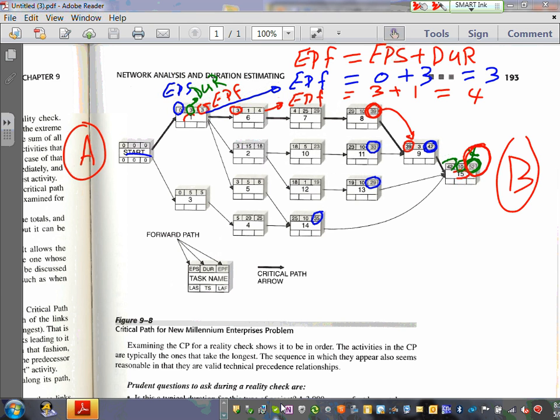So here's what I can do. Can you guys see this activity is taking 10 weeks? Now, Derek, come up with a brilliant idea of finishing this. What if I split this one into 2, right? 5 weeks here, and 5 here. Because I split the work into 2, guys, instead of this activity taking 10 weeks, if I add another designer on the project, I cut it by half.